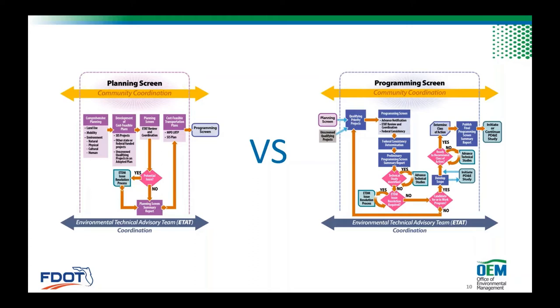what is the level of effort? What technical studies are we going to do? What level of study are we going to have to do? Are some of these studies going to be more extensive? What potential permits are being identified? What engagement? Are there any consultation that's required? And if so, is it formal? Is it not formal? All of these things help us figure out, as we're planning for the project, how much time, energy, and effort we're going to need to kind of move forward with that project.